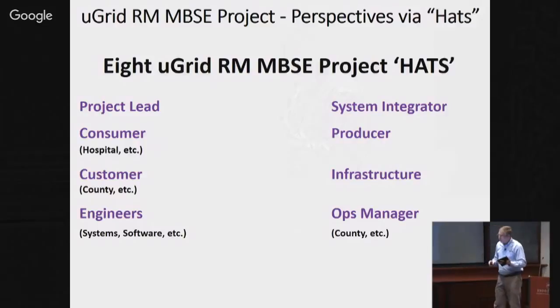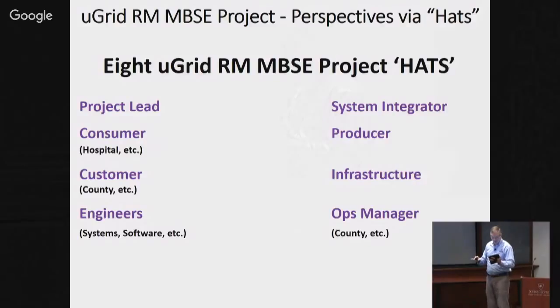At every workshop, the planning team used these methods to first get it down on paper. That's important, on the whiteboard or on the flip charts. Then we took pictures of the flip charts or the whiteboard. And then we used those pictures for the next process step. Then we repeated all the process steps until all the tasks were completed.